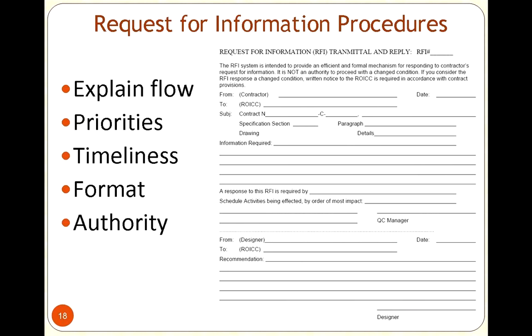And usually if you're tying it back to the contract, it's usually a pretty high priority, as some contractors may know. But also, when do we expect information back? I don't want to just fill out a piece of paper just because I've got the time, because guess what? I don't have the time. If I'm filling out this piece of paper for a reason, or filling out this form, or even if it was just writing an email, I'm writing it for a reason. I'm going to expect some kind of an answer. You can say it's going to take me till Thursday, but you need to give me an answer. So that's why it's important to say this is what we expect as far as getting information back.